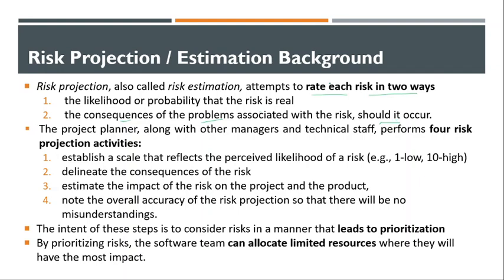And then the project planner, along with the other managers and technical staff, performs 4 risk projection activities. Let's see what those activities are. First, establish a scale that reflects the perceived likelihood of risk.